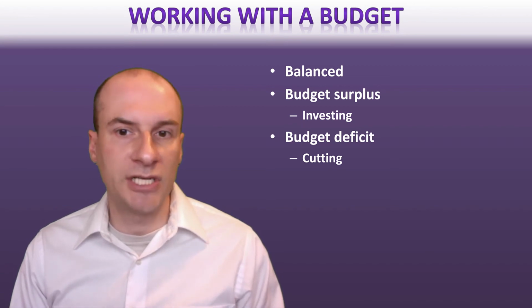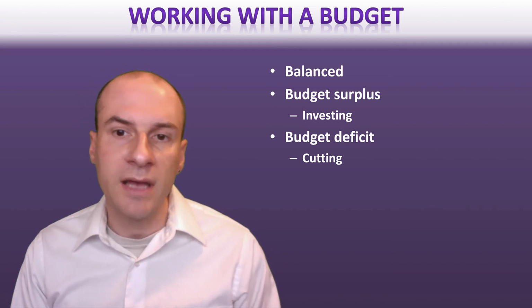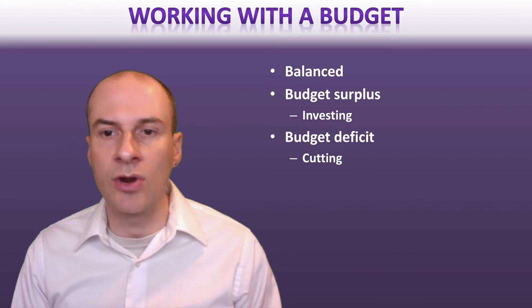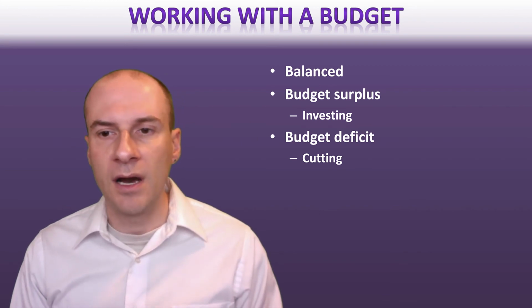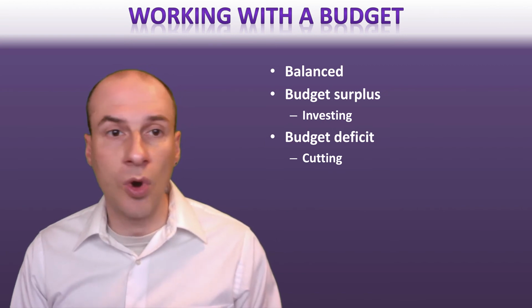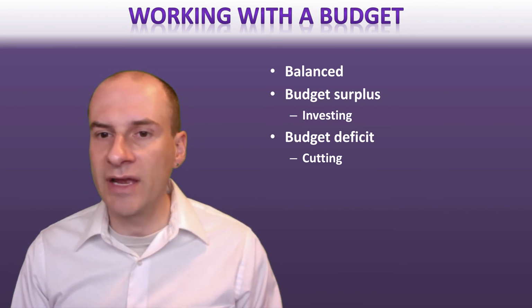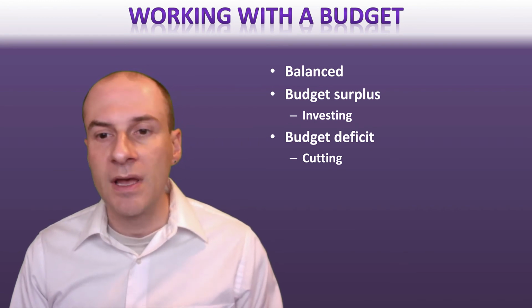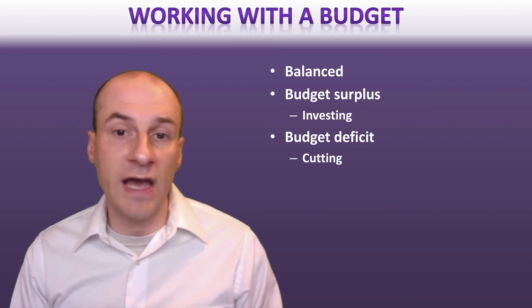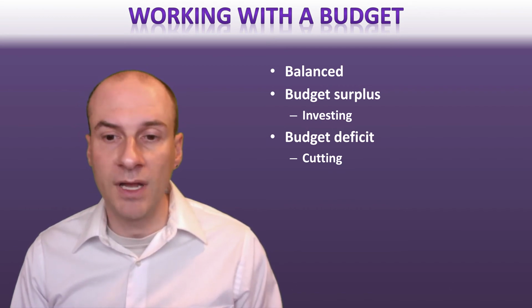You want your budget to be balanced. So you want it to be something where the money that you're bringing in matches the expenses that you have at the end of the year or whatever time frame you're working with. Now, sometimes you have the opportunity, if you have extra money, to hold on to that money and use it in a later year. That's not always the case in healthcare settings. In fact, it's often that it goes back into a general fund. But it's worth noting that it's valuable if you can come in under budget, because that allows you to keep funds for later years when you might need that money more.